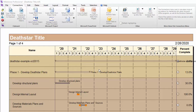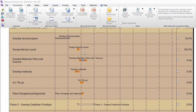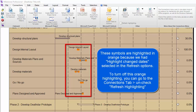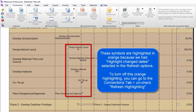Going back to Milestones, you can see these milestones got changed and the refresh highlighting is on — that's what the Highlight Change Dates option was. If you go to the Connections tab and look at Refresh Highlighting, you'll see it's checked. If you uncheck it, it hides that orange box. So that's what refresh highlighting is, and it's found in the Connections tab via that checkbox.